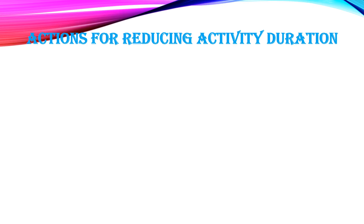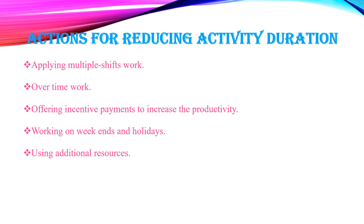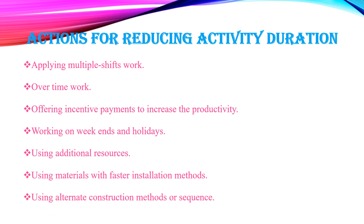Actions for reducing activity duration include: applying multiple shift works, overtime work, offering incentive payments to increase productivity, working on weekends and holidays, using additional resources, using materials with faster installation methods, and using alternate construction methods or sequences.